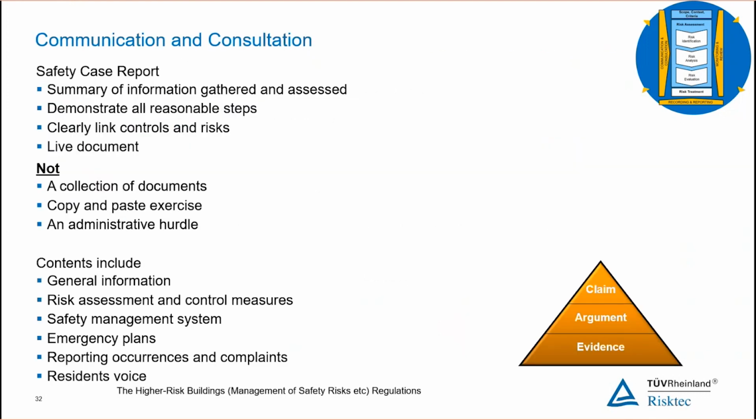With regards to communication and consultation, a key part of this is going to be the safety case report, particularly from the communication point of view. That is summarising, acting as the headline document to support the argument that the building is safe to occupy. That is the purpose of the safety case, to act as a headline, a pointer to where more detailed information supports the arguments that we're making, so that it summarizes all of the information.